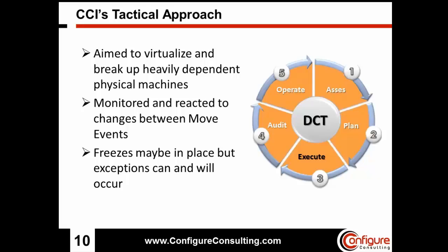So we continue to perform our discovery, we continue to look for changes in the environment, and we do change any of the move groups up if the business changes its need for those applications at that certain time.